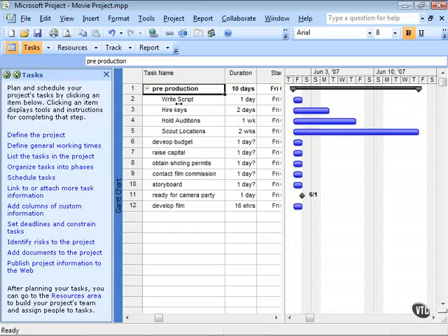Now, one of the things you can do to manage your individual tasks is that, of course, you can link tasks, because a lot of times tasks will be connected to one another in such a way that one task can't start until the other one finishes. In fact, that is the default task relationship that's used by Project, and that's called a finish-to-start relationship. There are other kinds of relationships that you can create as you link tasks, but again, that's going to be the default and is probably in the real world going to be the one that is most often used.